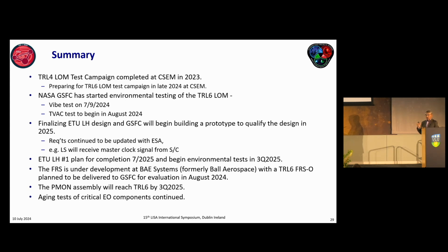We have started environmental testing of our TRL-6 LOM. The vibration test I showed was yesterday, and we are beginning to evaluate the performance post-vibe. The TVAC test is planned to start in August, and we are also finalizing the ETU laser head design, and we will build a prototype of it and qualify the design, meaning bring it to TRL-6 level, in mid-2025.